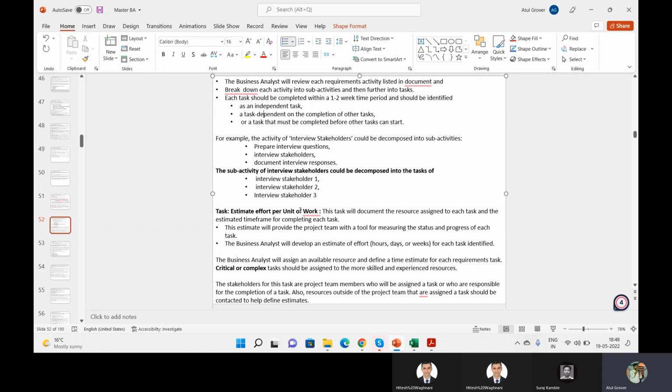So if any customer sends me a new requirement that I want to develop this catalog item, we have a few parameters for it. How can I say how much time it will take? I'll see how many variables a customer wants on the service catalog item. Number 1: if less than 5, simple; 5 to 10, medium; 10 to 15, complex.